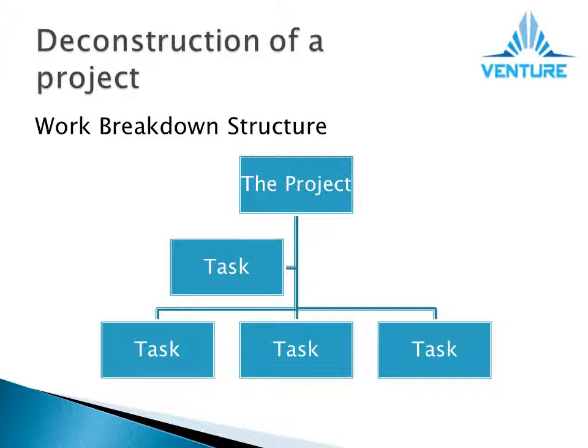The most basic method of deconstructing the project in order to get an overview is to complete a work breakdown structure. This identifies the tasks in a hierarchy of the most important and shows which ones need to be carried out before another can begin. This demonstrates that many tasks are dependent upon others. There are a few different ways in which you can break down the project. You can break down a project using an activity breakdown structure. This lists the key activities to be undertaken. Other ways include a functional breakdown.